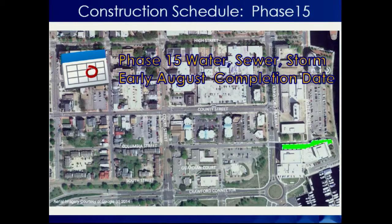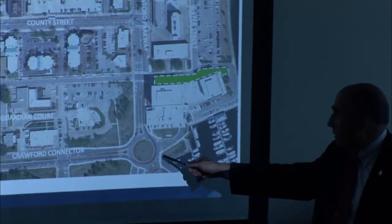This work in the green area next to City Hall will begin the week after July 4th. It's water, sewer, and storm. We will be relocating the treasurer's drop box to the other side of City Hall — we've worked with the treasurer to find a good spot. All of our work will be confined to the City Hall side of the concrete median on Columbia Street, and the temporary drop box location has been coordinated with the police department, fire department, and traffic engineering.